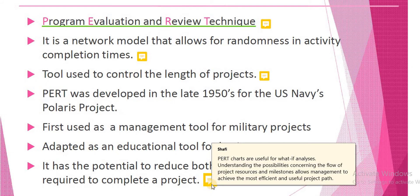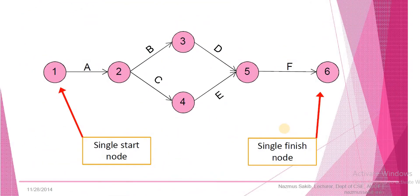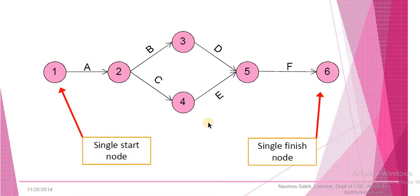So now let's look at an example of what a PERT chart looks like. A PERT chart is a series of nodes and arrows. There are two different types: activity on node and activity on arrow. This example shown here is the activity on arrow figure. The total project has a single start node and a single end node.